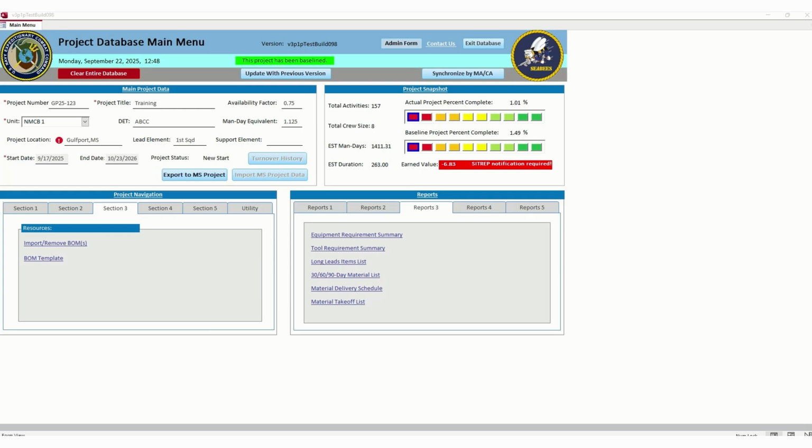Each one is going to have its own special format. So again, you can go here. When you go to resource usage, you'll see that it's a resource usage page, and you can see work, actual work, cumulative work, over allocation, cost remaining. Well, if you hit over allocation, then it's going to show you what you're over by, how many hours you're over, if you want to see that.